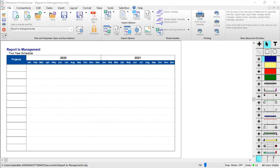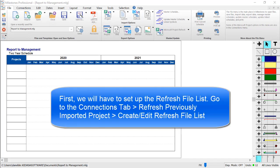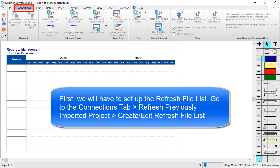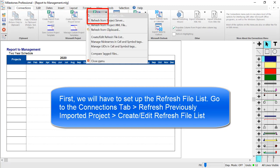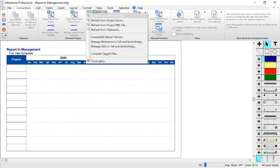First we will need to set up the refresh file list. To do this go to the Connections tab in Milestones Professional, click on Refresh Previously Imported Project, and then choose Create/Edit Refresh File List.